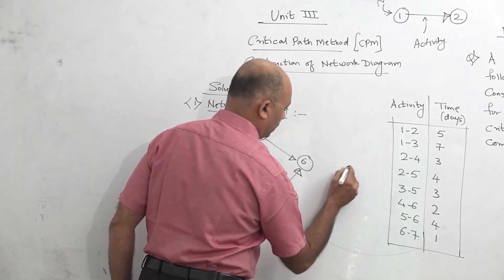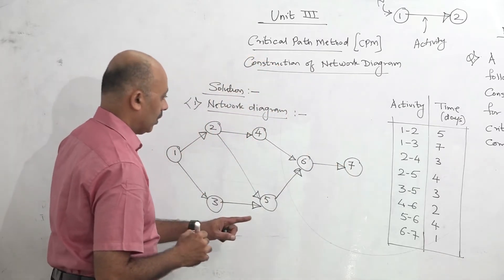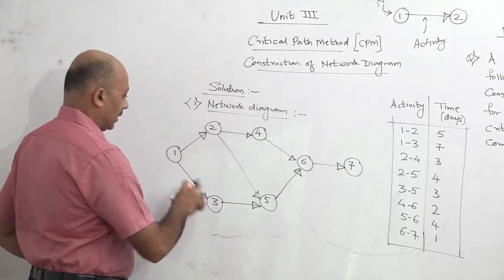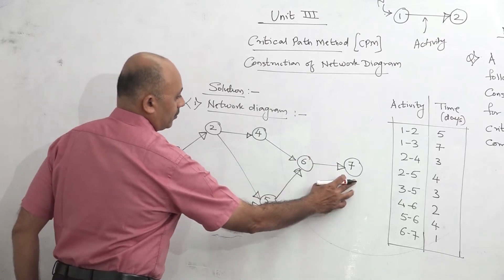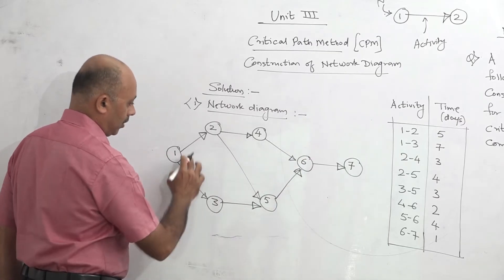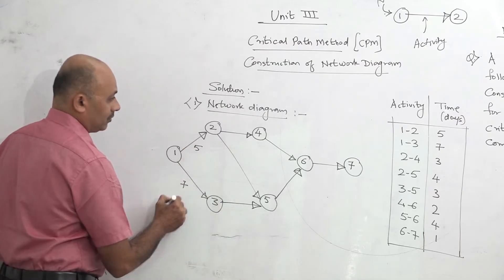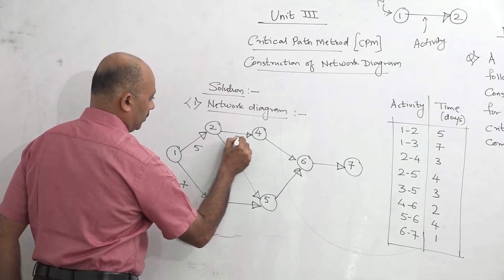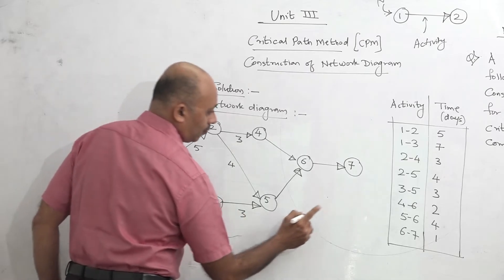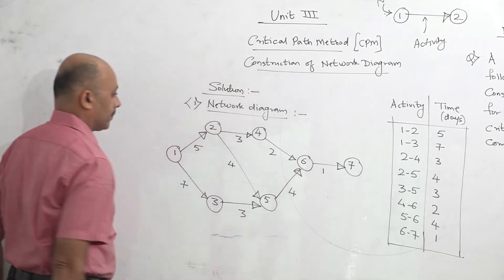The last activity is 6-7: we take event 7 and join — activity 6-7. Event number 1 is the start of the project, and event number 7 is the end of the project. The time is given; we will represent time under every arrow: 1-2 is 5 days, 1-3 is 7 days, 2-4 is 3 days, 2-5 is 4 days, 3-5 is 3 days, 4-6 is 2 days, 5-6 is 4 days, and 6-7 is 1 day. Our network diagram is now complete.